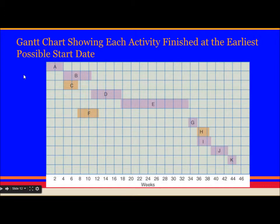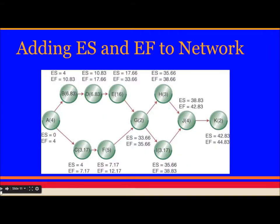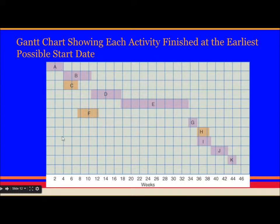This is the Gantt chart. Gantt chart shows each activity finished at the earliest possible start date. This Gantt chart we have drawn using the earliest possible start date using this activity on node diagram. This is just a bar chart. You can plot it on a piece of paper. And here you will see that the finish date is 44.83.